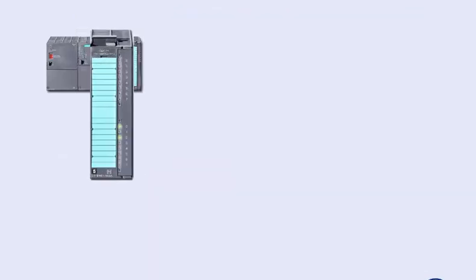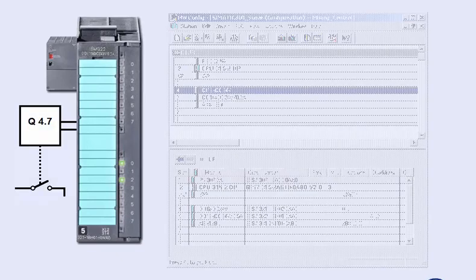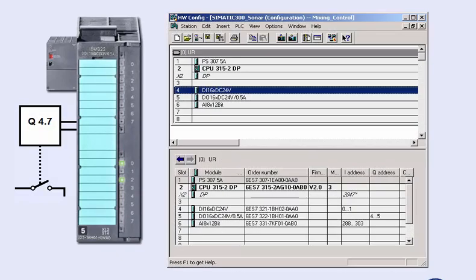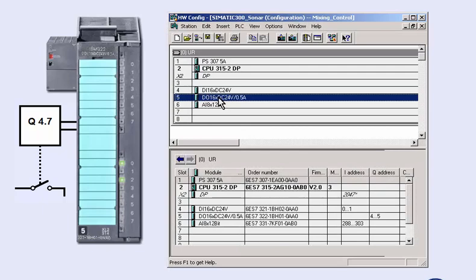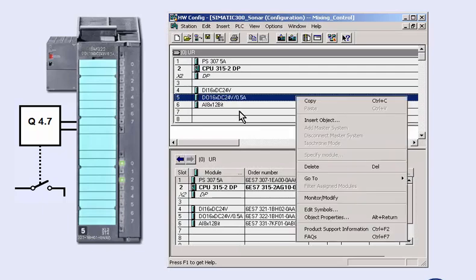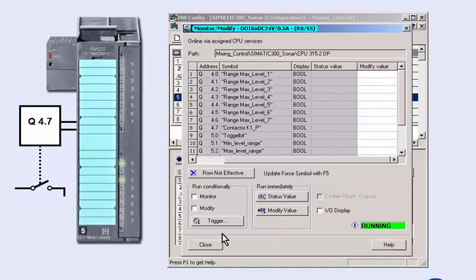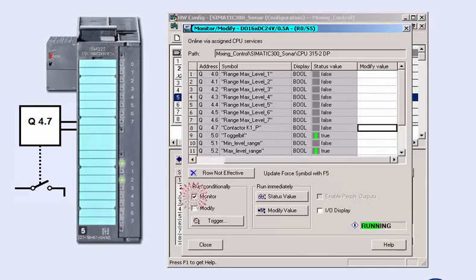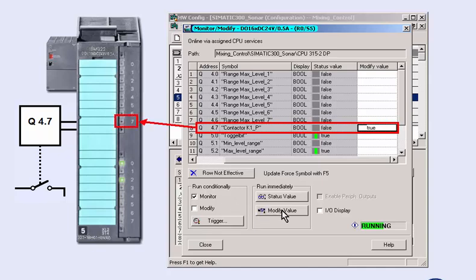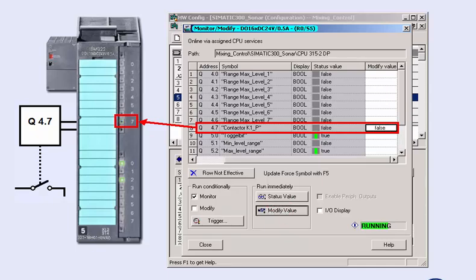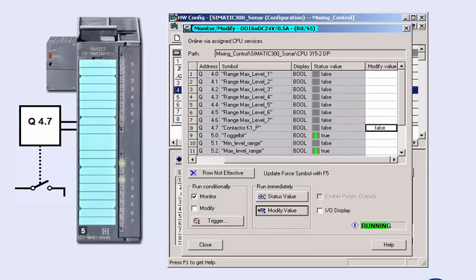In the same manner, we can also follow the signal path at the outputs. Before directly controlling the outputs, please ensure that, as a result, dangerous states cannot occur in the plant. We insert the value TRUE into the modify value of the output operand. By pressing the modify value button, we set the output and control, for example, a relay of the plant. After terminating signal testing, you have a verified hardware with tested I/O signals. The requirements for commissioning the user program are now fulfilled.